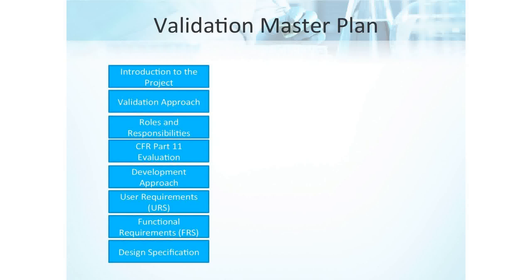So the development approach, this is really a section of the document. It captures the information in that development column from the prior slide, noting how the process flow corresponds with the validation contents. It's where you describe what type of SDLC you're using: waterfall, agile, iterative. The FDA doesn't mandate one technique over the other. You and your development team should determine what you're using and work with the IT QA group to make sure you have a clear definition of what SDLC approach you're using and any other information that will be important to describe what the validation approach is.